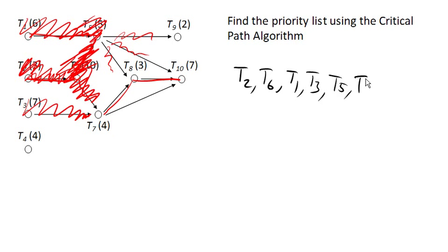If I remove this and say, what's my longest path now? It's going to be here. Task 8 and then task 10. Right? 3 and 7 gives us our longest path now. So we'll go ahead and add task 8.